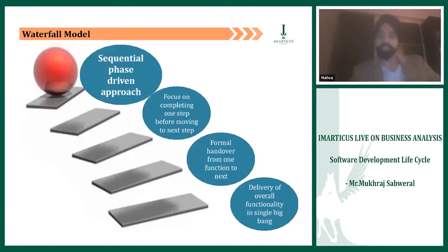So guys, Waterfall was like that. It was a sequential approach. You finish one thing, and only then does the next phase begin. For example, first the business analyst completes the whole analysis. Only after that does it go into designing. Once the complete design is written, only after that does it go into functional configuration and coding. When the coding completely finishes and is signed off, it goes into testing.